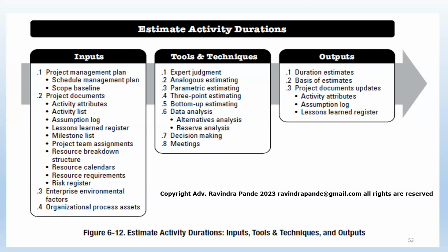So I might plan these extra resources, might be for a few hours, a few days, or a few sprints, depending upon the requirement. I might have to process this request at least 2 weeks ahead of time. That's what we are talking about in terms of planning resource management ahead, or proactively planning the resource requirement, or putting the said resource requirement proactively to the resource management team.